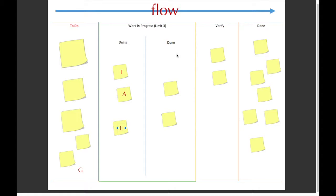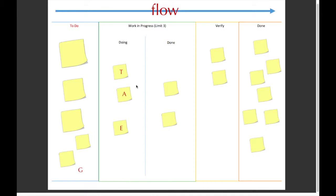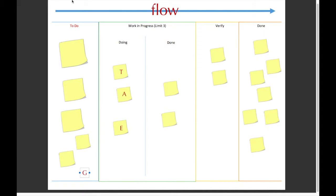The reason why we have a limit is because we don't want too much to be being worked on at one time, so that we can remove the process until other people can work on other things as well. So G down here, the limit is three, so he can't take a task and move it over to doing.